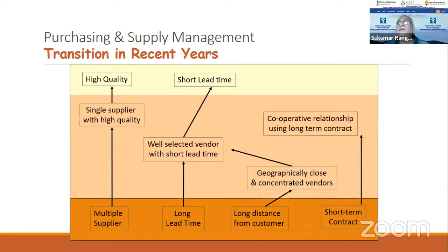In fact, we used to have this when one of our material items was oil-cooled transformer. So the major items used to be the steel, copper, of course laminations also mean steel, and the transformer oil, which is linked to crude oil prices. So we used to have one clause which says that if the prices vary, then at the time of delivery, we look at the indexes: the steel prices by SAIL, Steel Authority of India, copper from the London Metal Exchange, and transformer oil, crude oil from whatever index is there, with a certain formula.